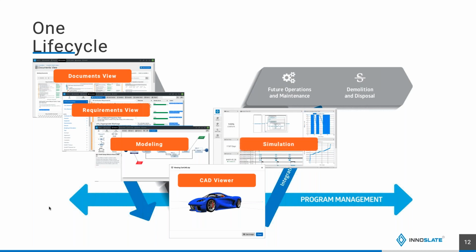And then, of course, simulation. We have discrete event and Monte Carlo simulation built into the tool. Those do work with cost, schedule, and performance factors. So you can do a very full modeling of the activity. And believe me, if you don't have Monte Carlo, you need it. You always should be using Monte Carlo because we don't know almost any number precisely, particularly early in a project. You're guessing. And you need to understand the range of possibilities so you can get a feeling for your risk, particularly in terms of cost and schedule on the programmatic side, that you're very worried about. Those risks are real. And if all you do is do the optimum path or what your best guess is, you won't be prepared for when things go well or when things go worse.